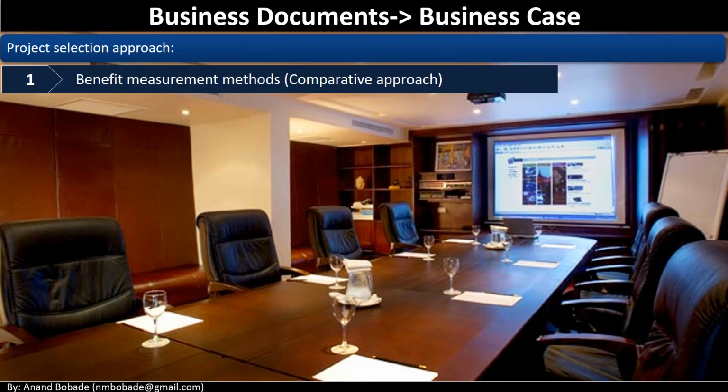Let's start with benefit measurement. It is a project selection technique based on the present value of estimated cash outflow and inflow. The techniques that are used in benefit measurement are the economic model, EVA, which stands for economic value added. It is a performance metric that calculates the wealth creation of the organization while defining the return on capital. If there are several projects assigned to a project manager, the project that has the highest economic value added is picked. The EVA is always expressed in numbers, not as a percentage.